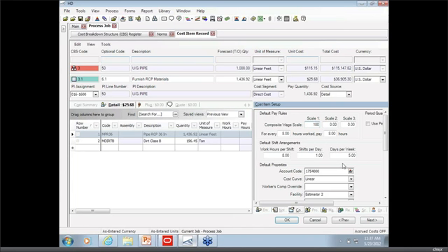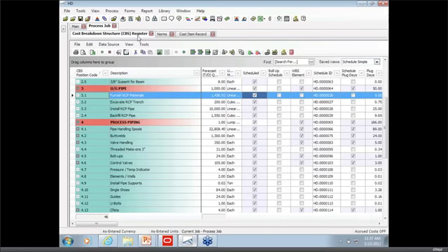And then the last one I had here on the written questions was, what methods does HD support for bringing progress into job tracking? Excel, timesheets, etc. So on the job tracking side, when you're measuring progress against this planned estimate, we can bring in your quantities, man hours, equipment hours, and percent complete through Excel. We can use timesheets. We can use APIs and integrations with ERP systems like Ron mentioned, SAP, Oracle Financials, JD Edwards, through an XML import. So a lot of options out there.